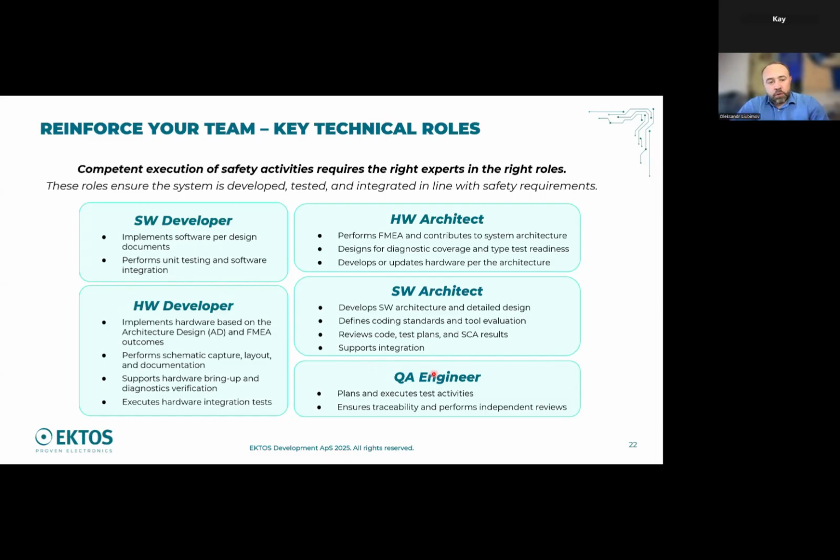What is important to say is that in your personnel plan, you need to describe who does what and which roles are addressed, and you shall not necessarily have one dedicated person for each role. You can mix that up. You can have one person doing several roles, but then you need to put a justification in the document for why you believe it's good.